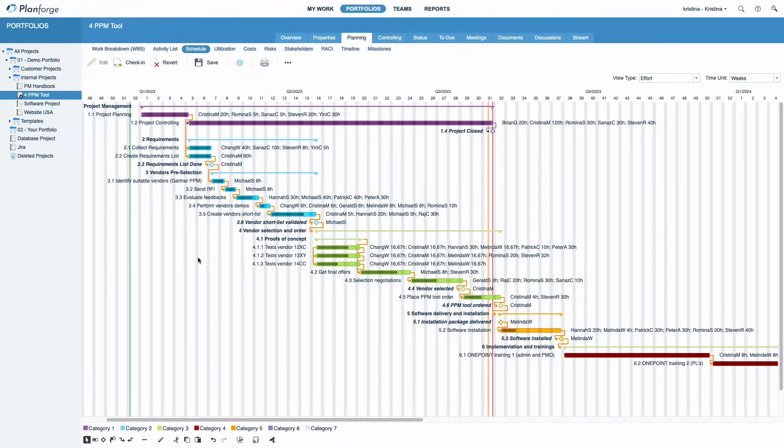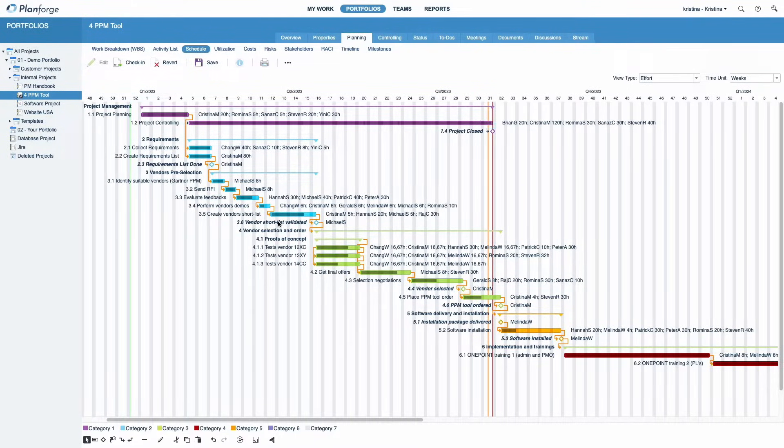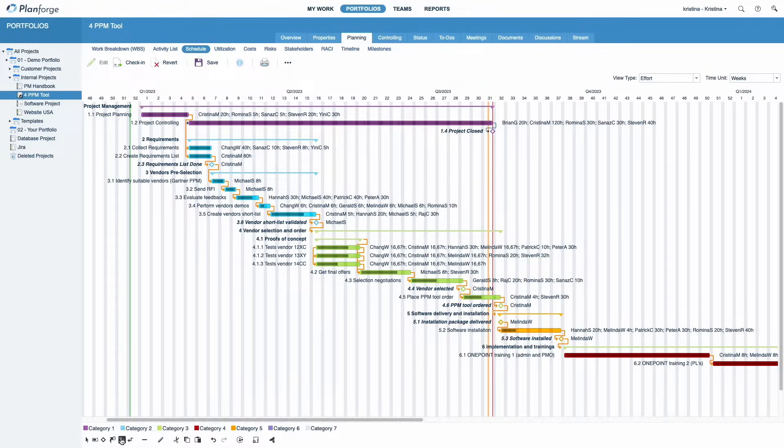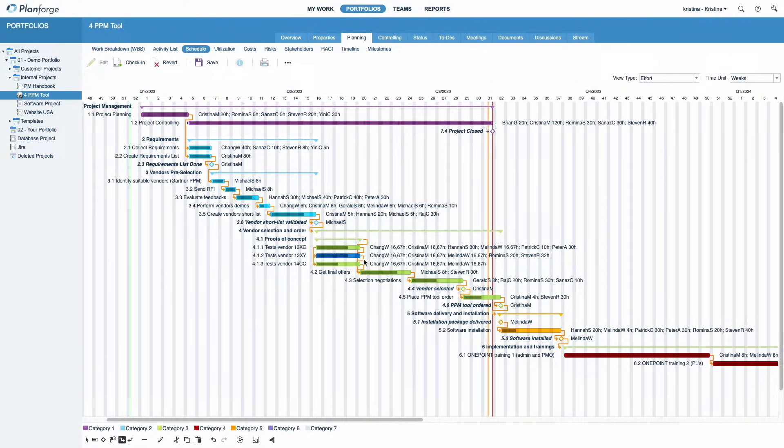In addition, dependencies between activities are clearly visualized. With PlanForge, you can also draw new dependencies by selecting the Dependency Drawing tool. Simply drag from the source to the destination activity.